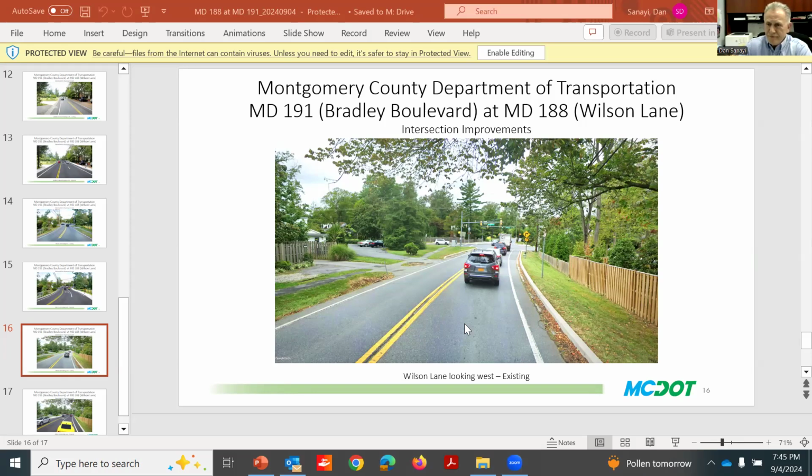Yes, Maria Mosconi mentioned that she submitted a sidewalk request 5 years ago, and that is true, Maria. All requests come through the sidewalk program. They start with our program. We perform the on-site field evaluation, and that determines whether it can be completed with a minor project by our program, or if it's capital improvement program, a major project needs to be generated.